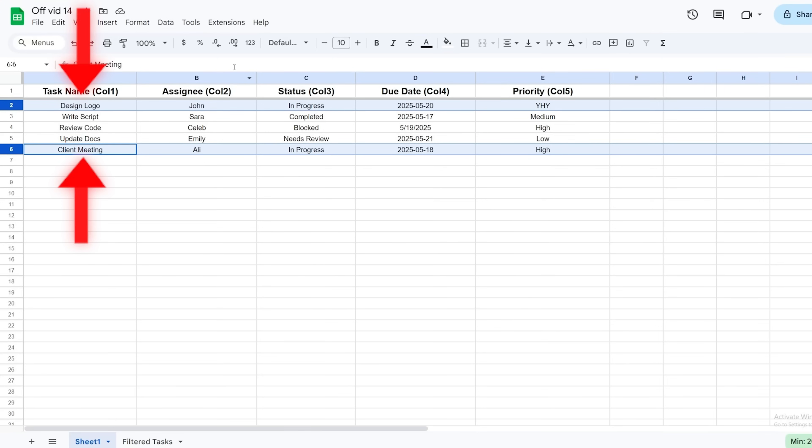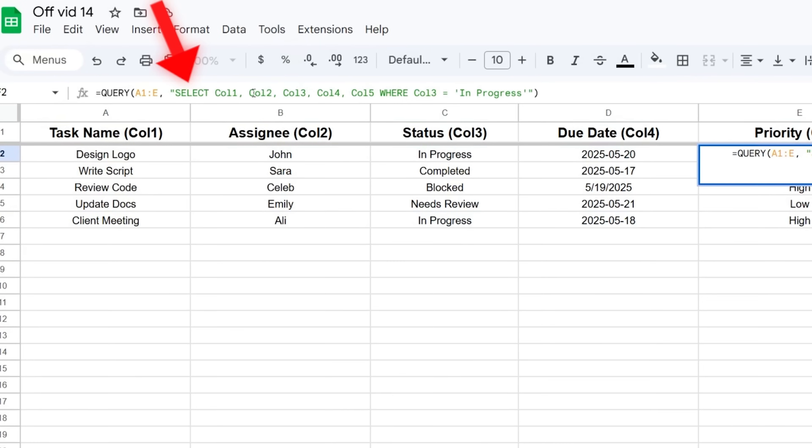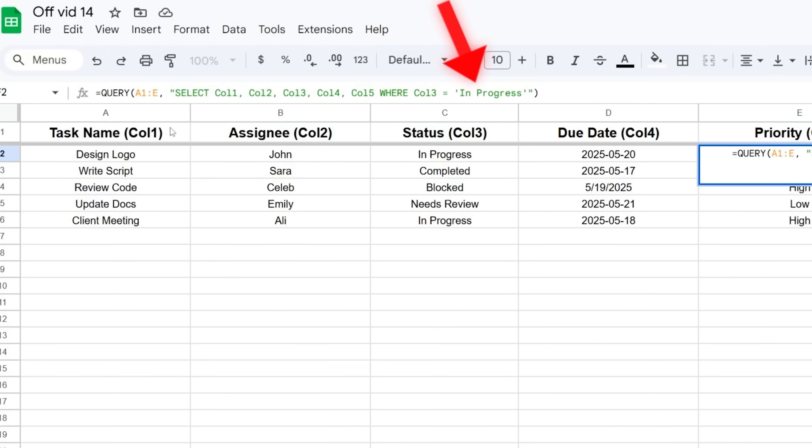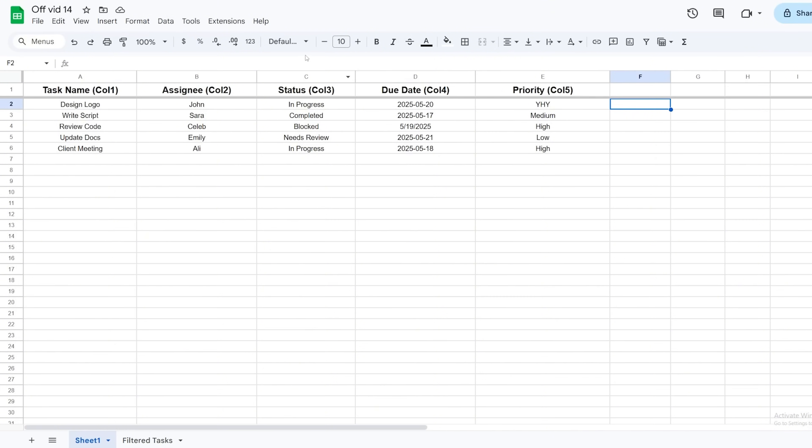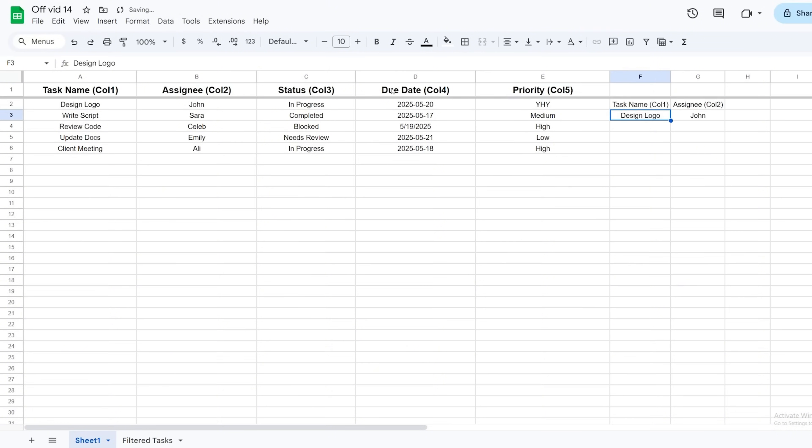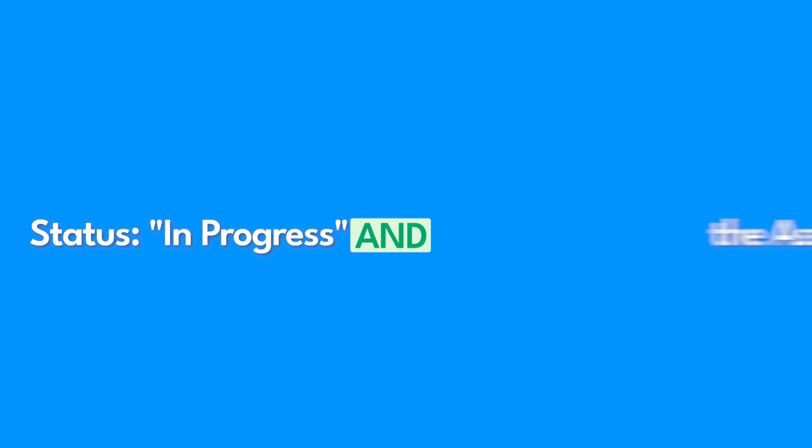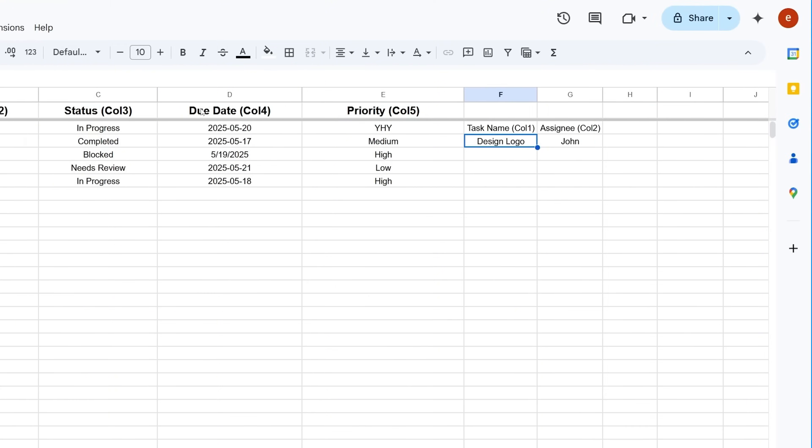Using our example: task name Column 1, assignee Column 2, status Column 3, due date Column 4. If you only want tasks where the status (Column 3) is 'In Progress', your command string would start: SELECT Col1, Col2, Col3, Col4 WHERE Col3 = 'In Progress'. Notice text like 'In Progress' needs single quotes around it; numbers don't. Want to see tasks assigned to John? Add WHERE Col2 = 'John'. You can combine filters using AND and OR. If you want tasks where the status is In Progress AND the assignee is John, you write: SELECT * WHERE Col3 = 'In Progress' AND Col2 = 'John'. AND means both things must be true.